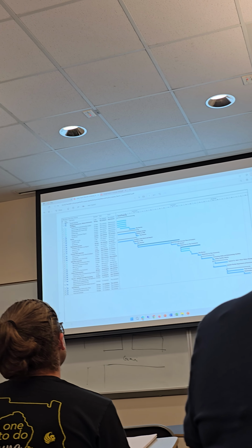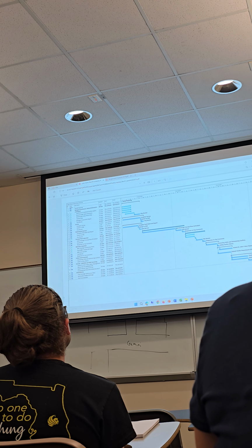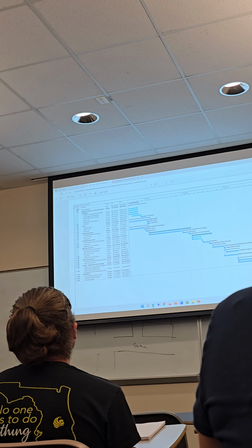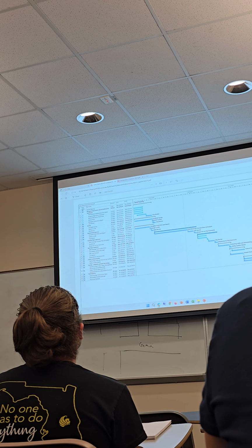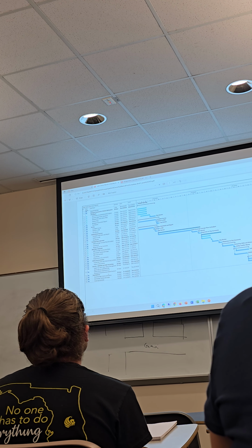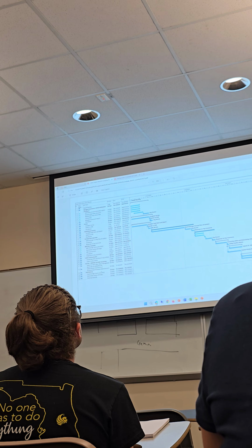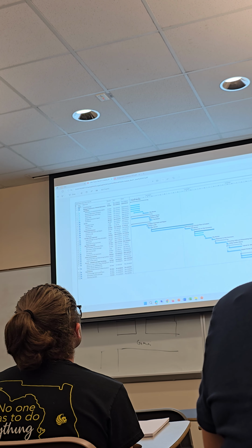And in this particular project, there was a conceptual plan submittal. Then there was what we call a 60% plan submittal, some utility coordination, permitting, and then final. Okay. So this is an example that kind of shows you how those things work together.